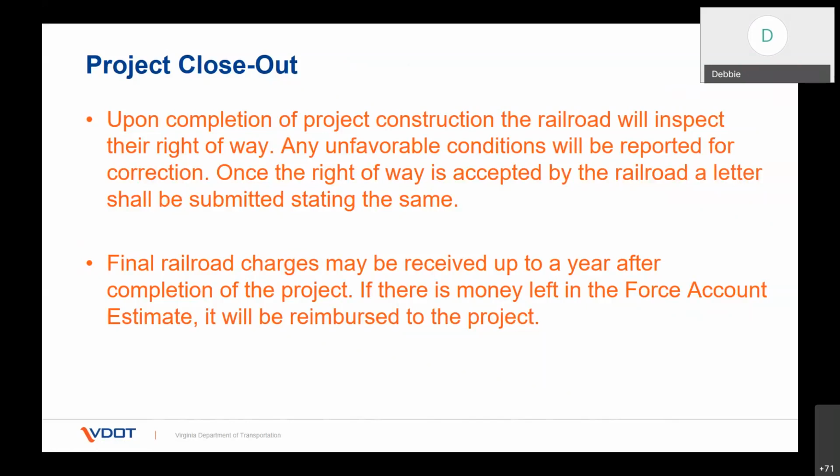Want to let you know there has been some times with our projects that we get a final invoice, and maybe a little bit later another will come just because they got hit with charges, but they hadn't anticipated yet. So sometimes that does happen. We recommend that you leave funding available for the railroad up to a year after your project is completed and the railroad has accepted the right of way.